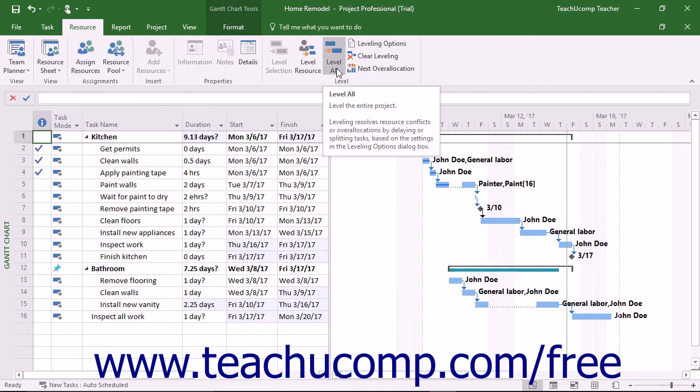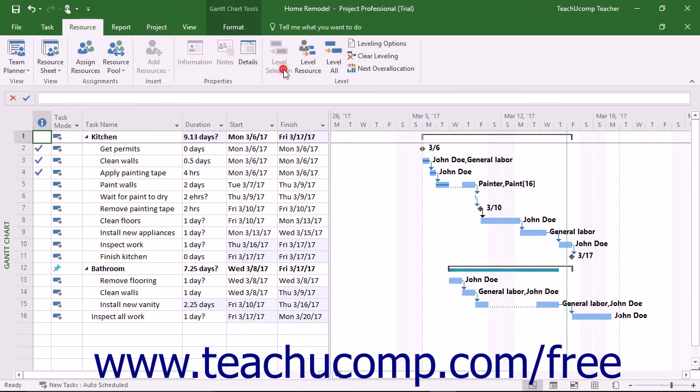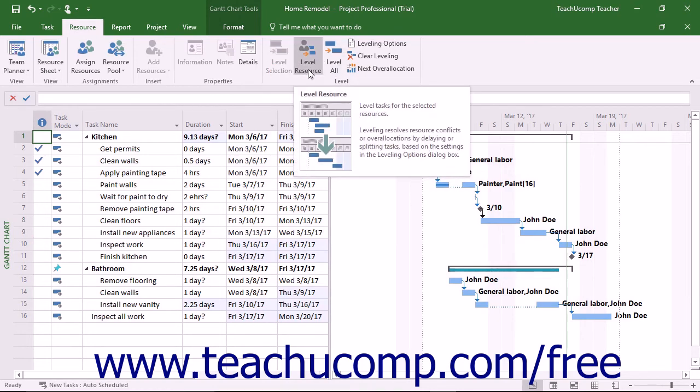To level a selected task or resource in a project file to manually level resources one at a time, you can click the Level Selection or Level Resource button in the Level button group on the Resource tab in the ribbon.